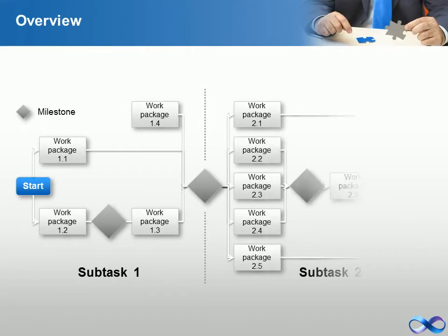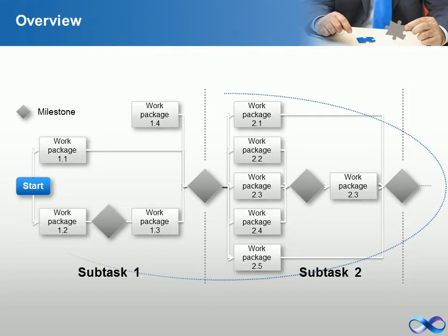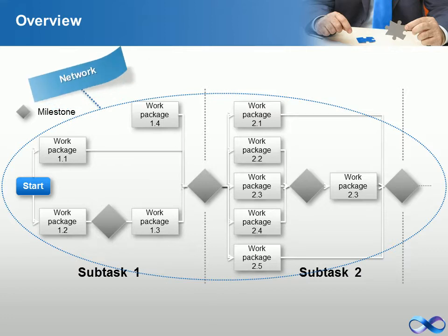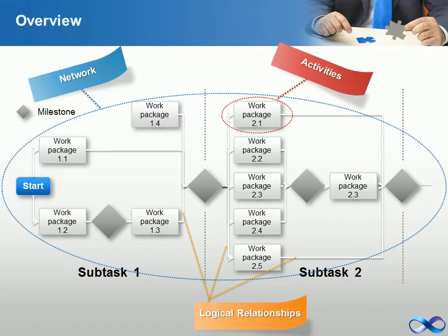The precedence diagram method is a tool for scheduling activities in a project plan. It is a method of constructing a project schedule network diagram that uses boxes, referred to as nodes, to represent activities and connects them with arrows that show the dependencies and relationships. This technique is also called activity on node, AON, and is the method used by most project management software packages.